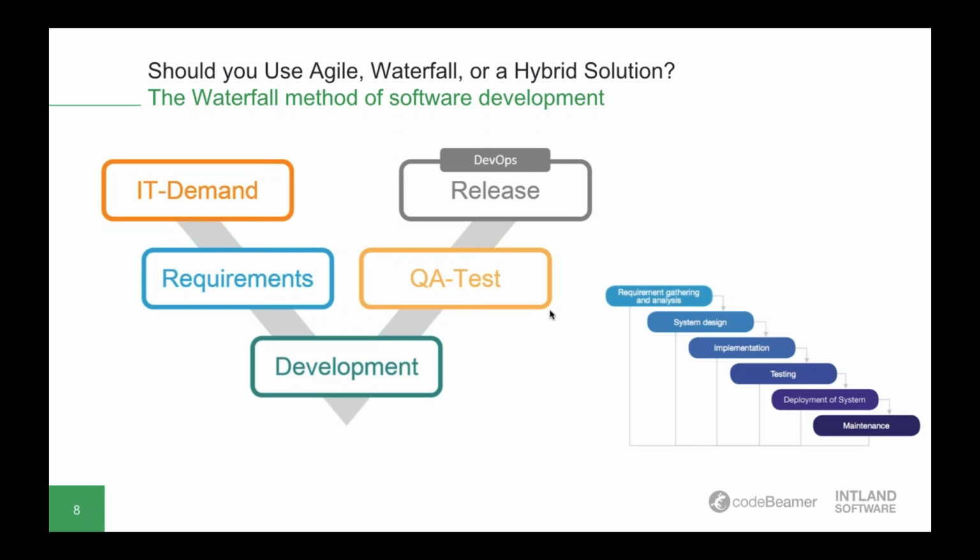So overall, Waterfall provides a structured and planned approach to development that works well in embedded software development with projects that are not too extended in time and where the technology is just well known. So as soon as the duration of the project is extended and as soon as changes start coming in with it, that's when you might feel that you might need a new approach.